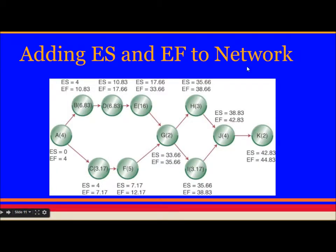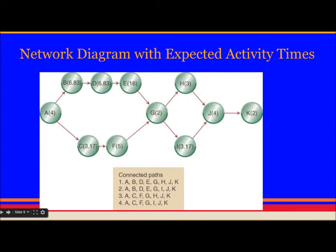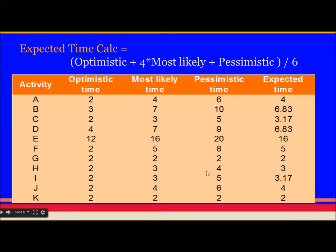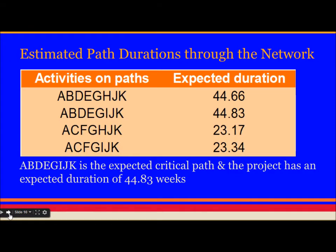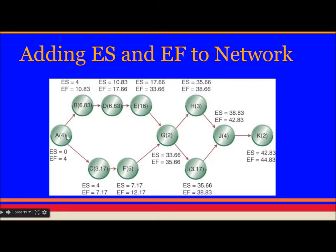Adding early start and early finish to the network. If you don't know how to do early start and early finish to the network, I will again ask you to go back to my video which explains critical path method. There I have explained how to do that. You can use these values calculated here to make this diagram with ES and EF in the network. It is very easy to do. You just need to add the early start and duration to come up with the early finish.